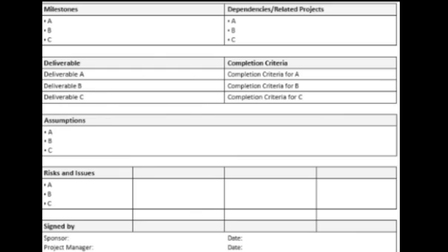You said your milestone A is 1 week, and you'll be delivering the foundation of the house to the DPC level. So what the supervisor wants to see when he comes after that 1 week is that the foundation has been done to the DPC level. If he comes in that 1 week and finds out that you've not gotten to that DPC level, it means you are going to receive some query. So that's what the completion criteria is talking about. Then maybe deliverable B now is that we said we'll raise the blocks of the house to the roofing level.